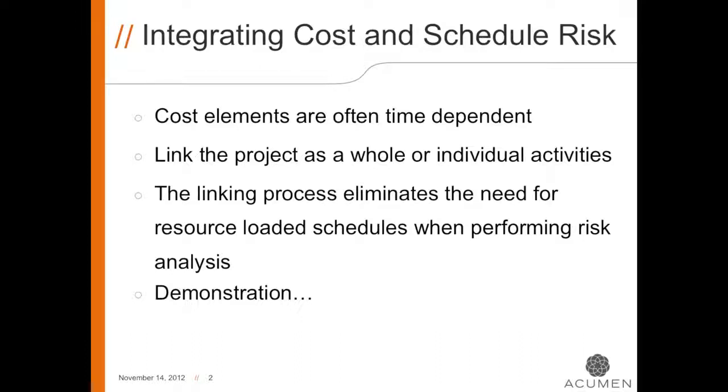By linking cost and schedule risk in Acumen Risk, you won't need a resource loaded schedule. Because we can link cost and schedule at the activity level, the cost and resource information doesn't need to be preloaded into the schedule.